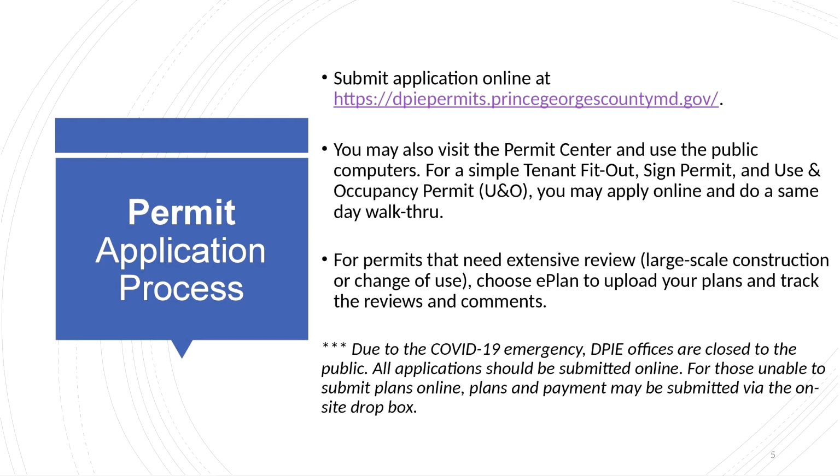For simple tenant fit-outs, sign permits, and UNO permits, you may apply online and do a same-day walkthrough of the permit. For permits that need extensive review, such as large-scale construction or change of use, choose ePlan to upload your plans and track the reviews and comments.